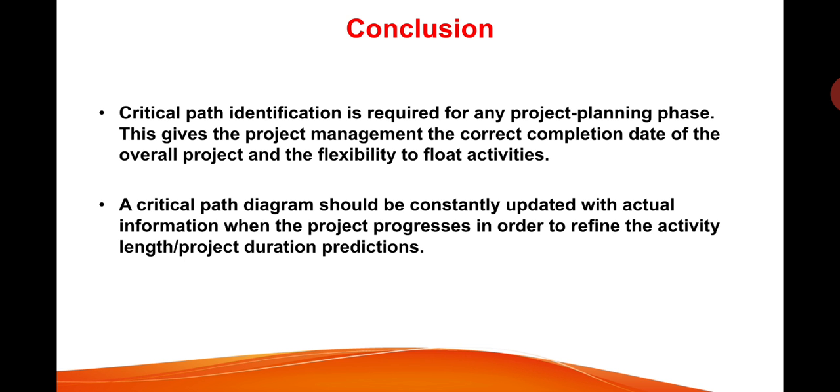So last, conclusion: critical path identification is required for any project planning phase. This gives the project management the correct completion date of the overall project and the flexibility to float activities. The critical path diagram should be constantly updated with actual information as the project progresses in order to refine the activity length and project duration prediction.